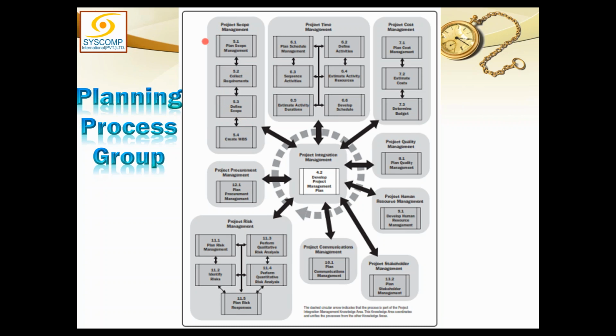It is how to manage the plan, how the plan will be made, who is responsible for doing what, how the things will be done in the planning. So if I am talking about, say, the schedule management plan, it will tell me how to define the activities, how to sequence the activities, how to do the estimation of resources and duration, and how to develop a schedule.